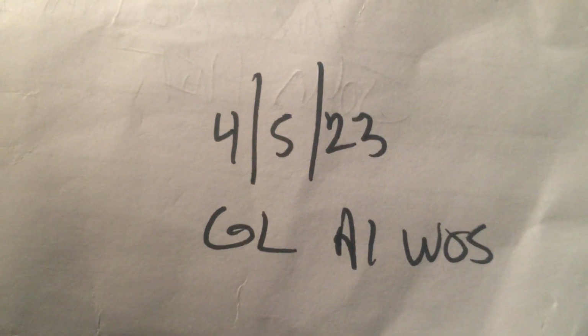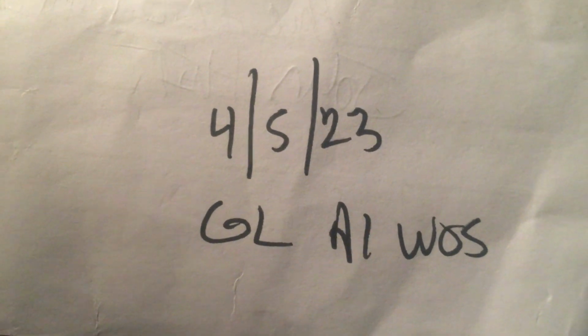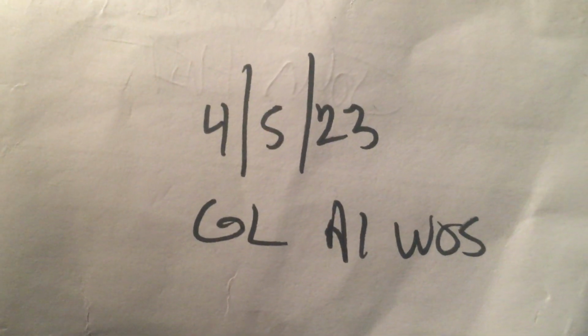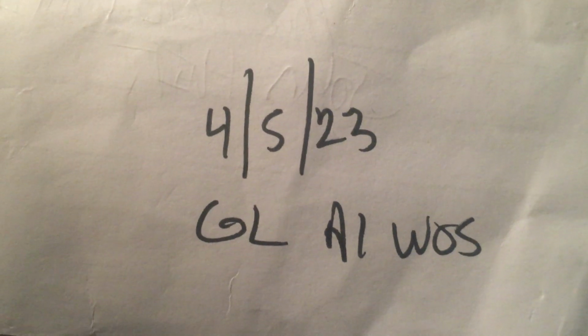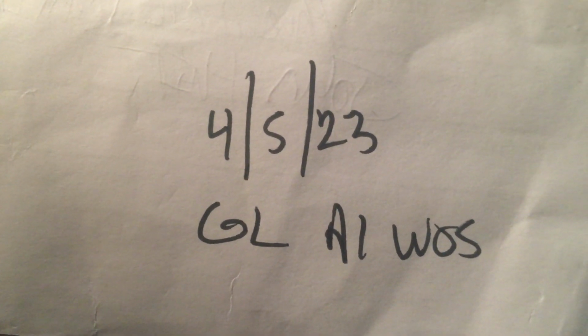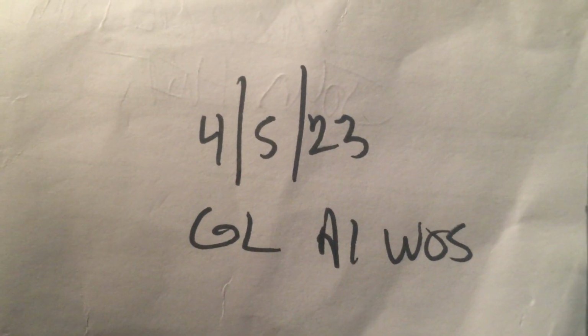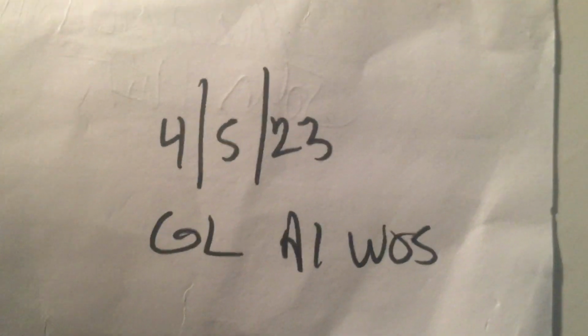So typically if someone is making you whole, if you're a general contractor and you want to be made whole on your subcontractor's policy, you need to make sure that they have that additional insured wording, so you are named as an additional insured on their policy. There's a waiver of subrogation, which means in the event of a loss where they're liable, their insurance company will not come back to you. And primary non-contributory, in the event of loss, theirs will respond first and your insurance won't contribute.